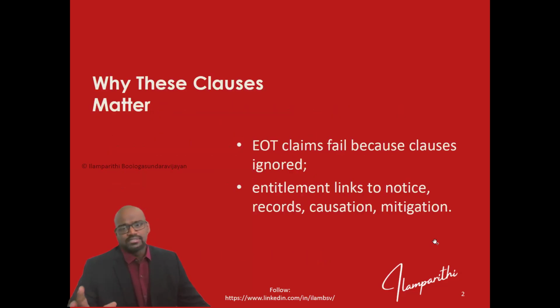So why do these clauses matter? EOT claims fail mostly because the contractual clauses get ignored. If the contract clauses are not properly quoted, the entitlement itself will change.